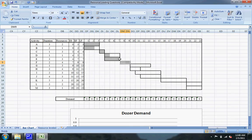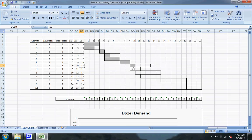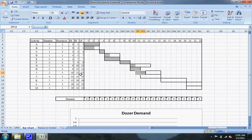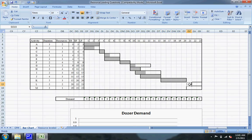Activity F will not have any float. Activity G will have float — 3 days of float — because the early finish is on the tenth and the late finish is on the thirteenth. Activity H is on the critical path and will not have any float; the early finish is the same as the late finish. Activity I should have 3 days of float because the early finish is the twelfth and the late finish is the fifteenth. Activity J is on the critical path and won't have any float. Same with K. Activity L will have 1 day of float — the early finish is the twenty-second and the late finish is the twenty-third. And Activity M, the last activity, will not have any float; it's on the critical path.